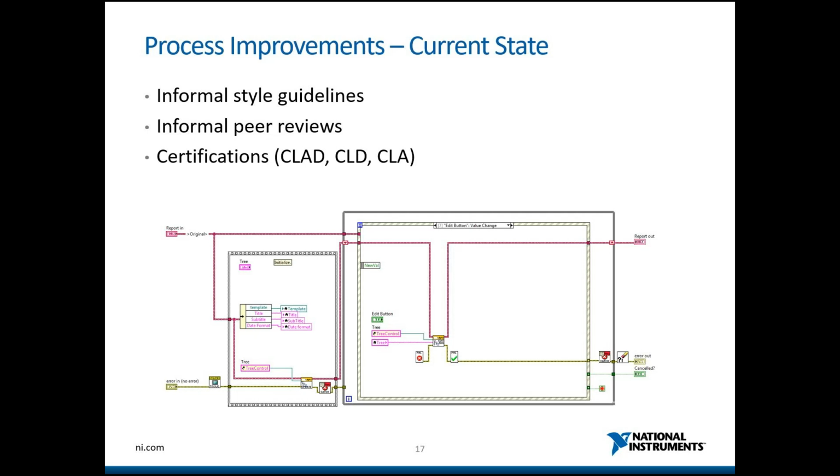So I'm kind of breaking it down like an agile process. The first stage would be: install DeCAF, get it set up, get a PID module set up to read the temperature and control it. It's controlling via a heater, so it's set up like a pulse width modulation module for the heater. And that would pretty much be it. PID, you set the set point, there's the heater, you get a graph.